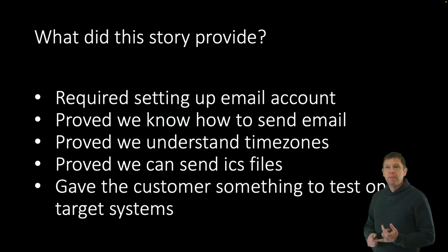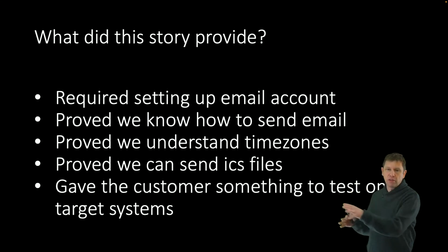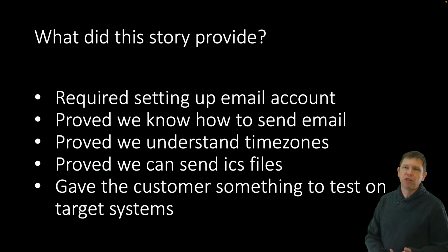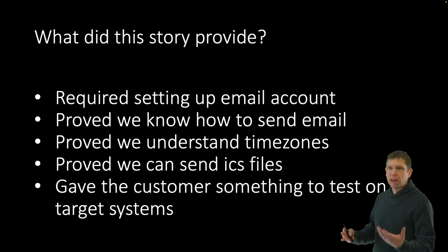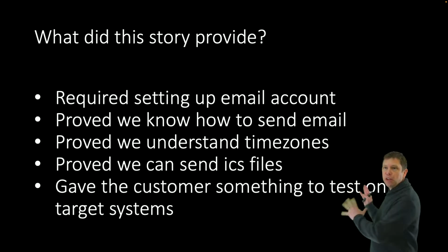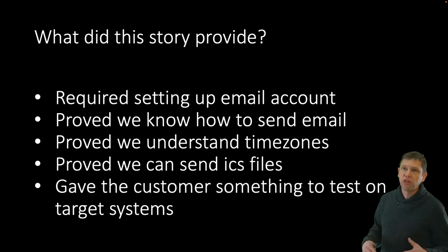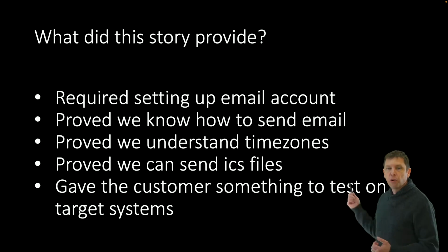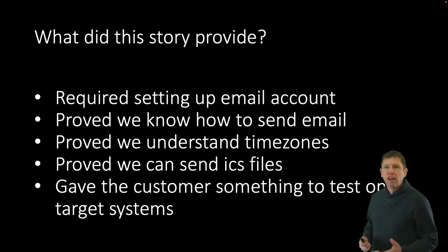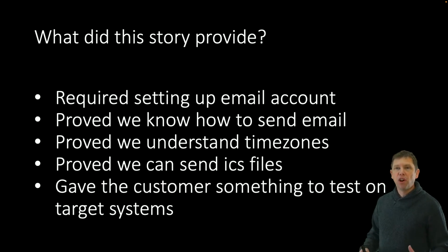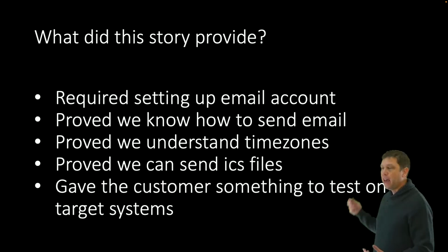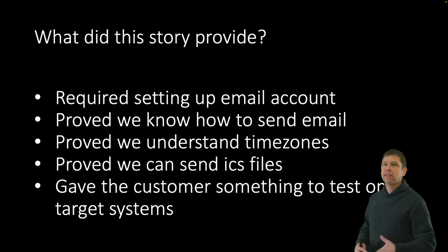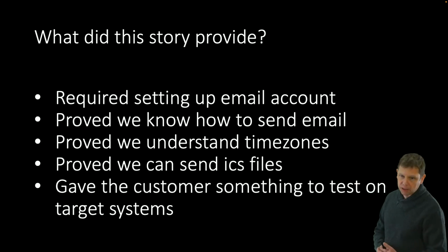Well, it required me setting up an email account. In this case, I'm sending it through AWS, but I had to get the credentials worked out, which can be as simple as this sounds when we just created a form. Sometimes just getting the credentials in some organizations might take a lot of work. It also proved that we know how to send email. That's not necessarily a given. Depending on your environment, where your server is and so on, that could be a very large task to get the ports open that you need and those types of things.